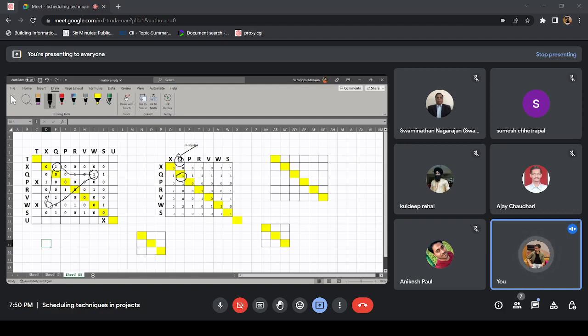So this algorithm helped you, you don't have to traverse all the activities. You identified that you have to start with q. From q you got one block, q, w, and x, right? Did you guys get what we did right now? Clear. So we identified one loop, one block. We made another block, right? QWX, QXW.